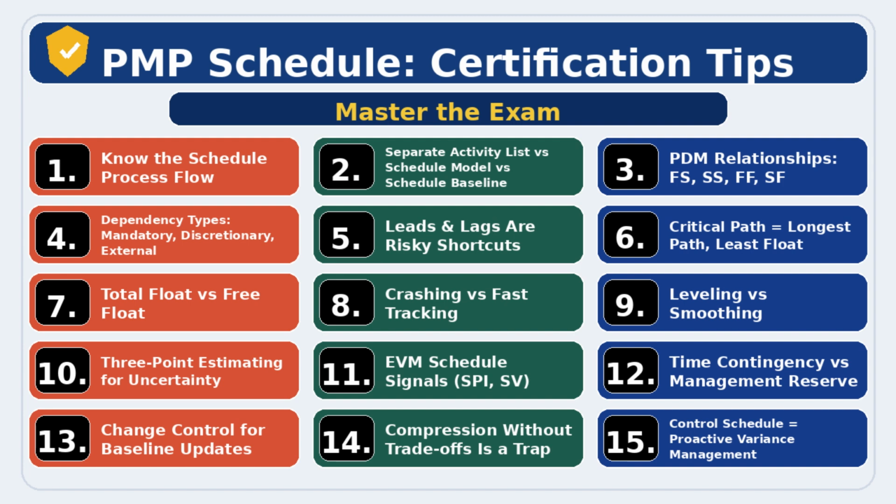We'll move on to the first step. Know the schedule process flow. If you don't know the order, the exam will make you guess. Here is a mini scenario. You already have a WBS and scope baseline. What is next? You need to define activities, then sequence activities.